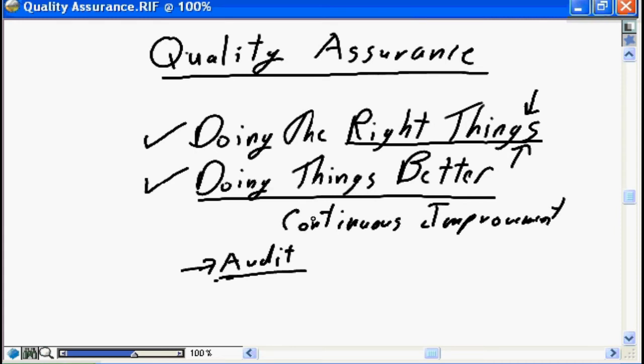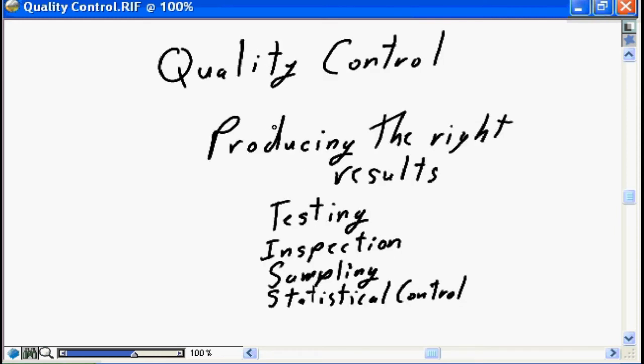Often, the continuous improvement is the root cause analysis. Why are problems being discovered on the project? Why are we identifying 3 and 4 and 5 errors per walkthrough? Are the requirements incomplete? You do the root cause analysis as part of doing the quality assurance process to ensure that all actions on your project are meaningful and that all actions on your project are contributing to the final deliverables that will be signed off and approved by your sponsor. The next and final step of quality management is quality control.